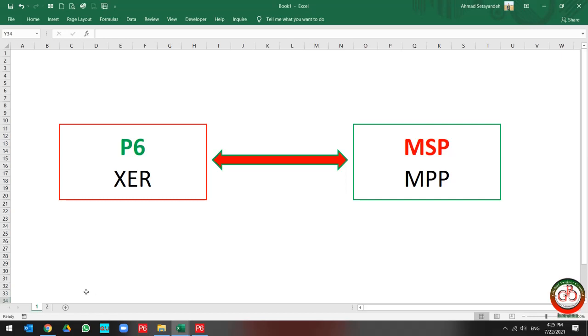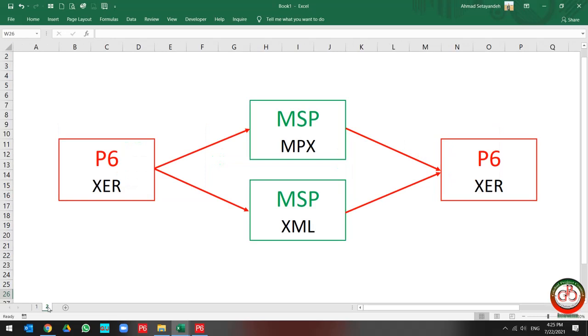As you know, these two software are connected to each other by database file formatting. But how does this file formatting work for us? You can change the Primavera P6 XER file to Microsoft Project MPX file or Microsoft Project XML file. And this BOSAP file could be converted from Microsoft Project by MPX and XML format to the Primavera P6 XER file. These file types are accepted between these two software.